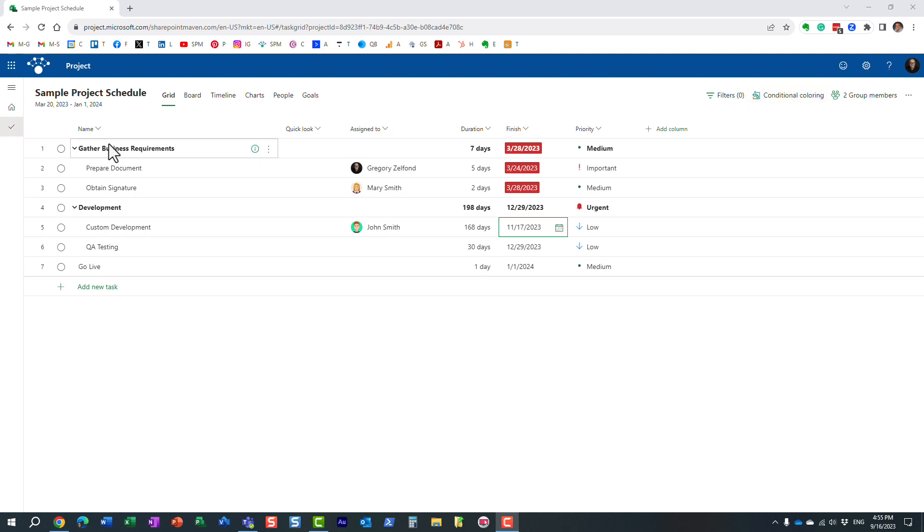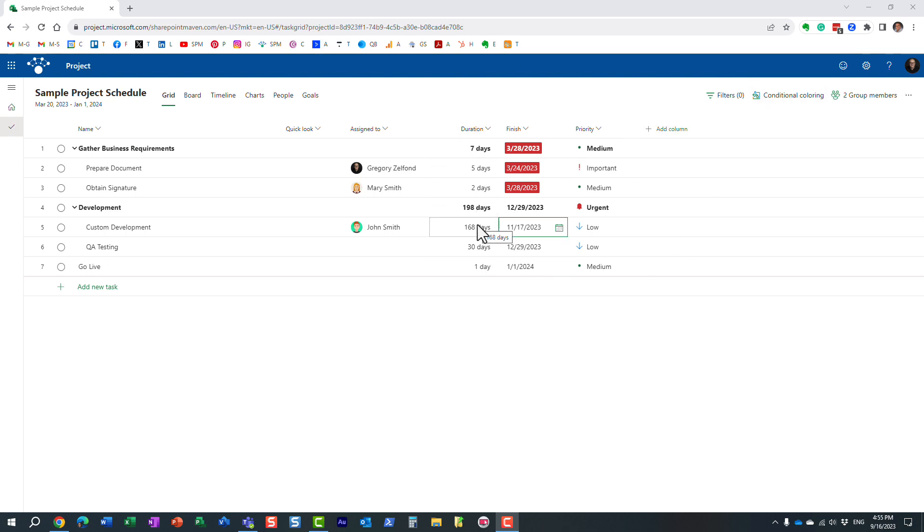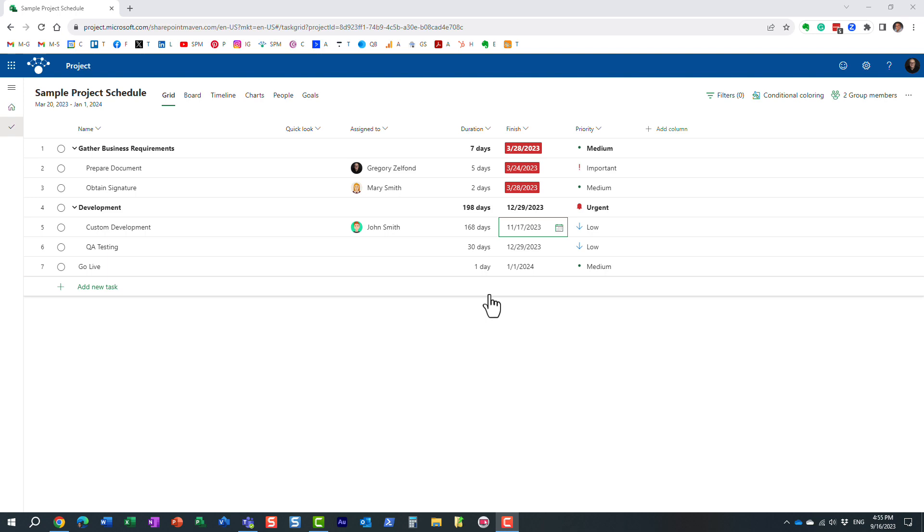So here I have a sample project schedule with a few different columns and data. Let me show you, for example, let me give you a use case. I want to highlight all the durations where duration is maybe bigger than 15 days. So I want to highlight all the tasks in red where the duration is more than 15 days. So let's do that.